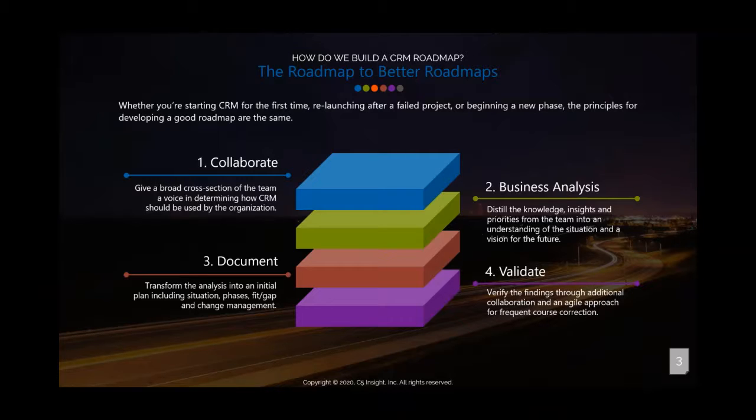There are some clients we work with that every year when they do their plan, they begin scheduling 6 months before the end of the year in order to begin the planning so that it's done, in place, and ready to go by the very beginning of whatever their fiscal year is going to be. But others go in and out of this within about a couple of days to a 1-week period. So you can right size this for your organization.